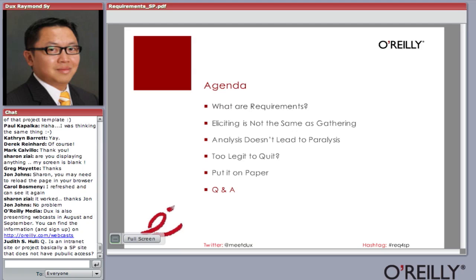After you've defined your user requirements, then you can spec out your system requirements to support those user requirements, to support those business requirements. And then the whole process of doing all this is elicitation, is gathering and understanding what people need or want, and do this a bunch of times. Based on what you've elicited, you got to analyze. You got to make sense of it. Are there any gaps, right? So that spreadsheet I showed you helped me a lot.